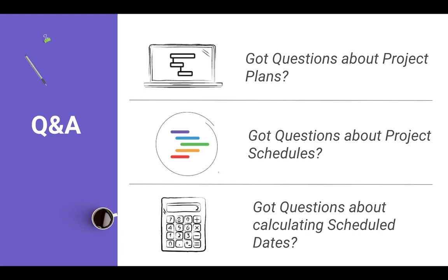Another question related to these user estimated dates is, if an assignee edits a date on a task, how does this affect the scheduled date? Does the scheduled date follow the plan date? Does it follow the assignee's created date? Or something in between? The answer is what I just referenced: the only dates that an assignee can ever edit or create are those user estimated dates. And the project manager has to allow for the assignee to have that ability.